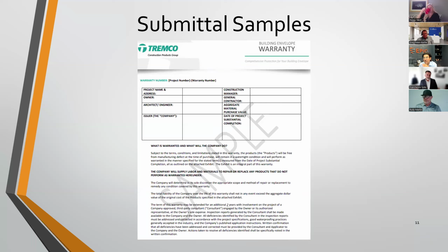Correct. And even with that roof example, I'm thinking about the back end, if there is going to be a defect of some sort after the project is done. From a roof standpoint, even getting the manufacturer involved can help from a paper trail, right? The manufacturer may come back and say, hey, this isn't a warranty item, this is a workmanship related item. Or they might point in a different direction. And from the litigation standpoint, from the expert standpoint, as well as Frank's litigation standpoint, that also helps. You have a separate party saying the same exact thing to, hopefully, get a resolution.